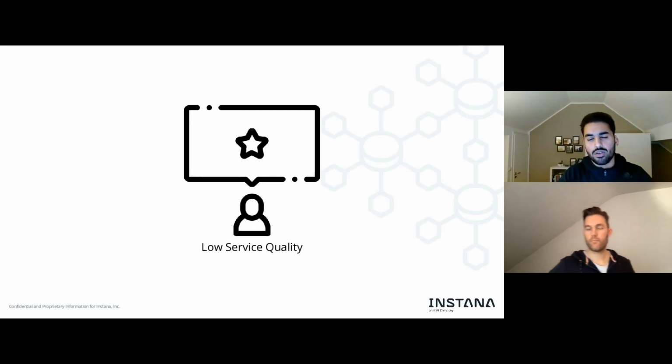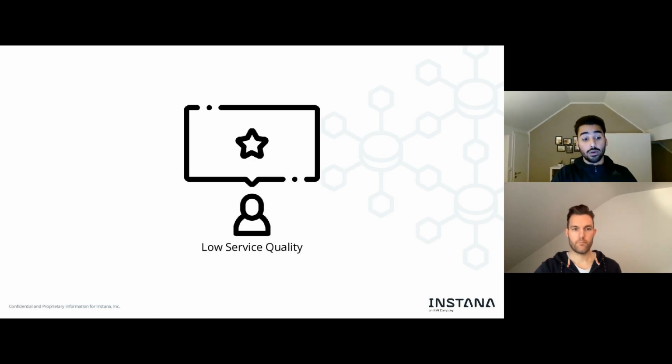And what we also did not have was a certain kind of tracking, right? So how do we actually perform work? It was a very, let's call it, binary state. So either work is done or it's not, right? So it's in progress, or it's done, right? So we never really knew where exactly we are with this, what is missing, and where we may need help. So this was something that directly affected our service quality.